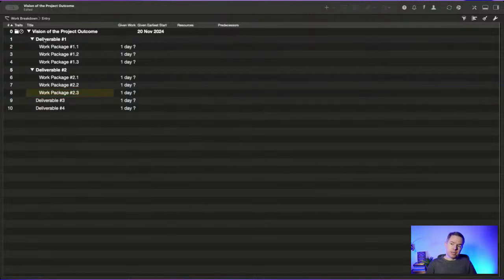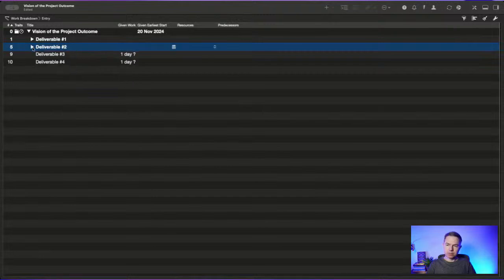Another approach, which is totally acceptable by the WBS standards, is to have your life cycle phases on the top level. Each phase will then have its own deliverables and its own gates, decisions to proceed or not to proceed.